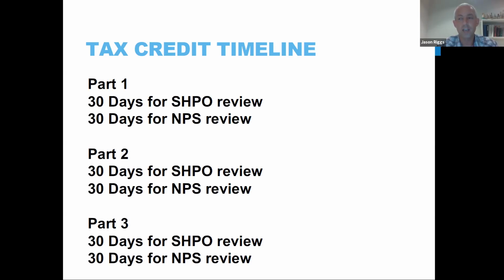So if it's only a state project, it's only a 30-day review period for each of these, and then you'll receive your response. If it's a federal only project, there is still this 60 days because SHPO, even though you're not getting state historic tax credits, does still review and comment on the work, and then they ship it up to NPS.